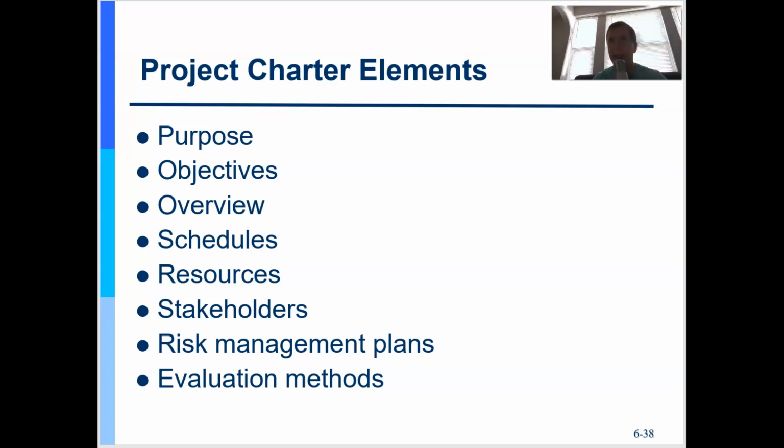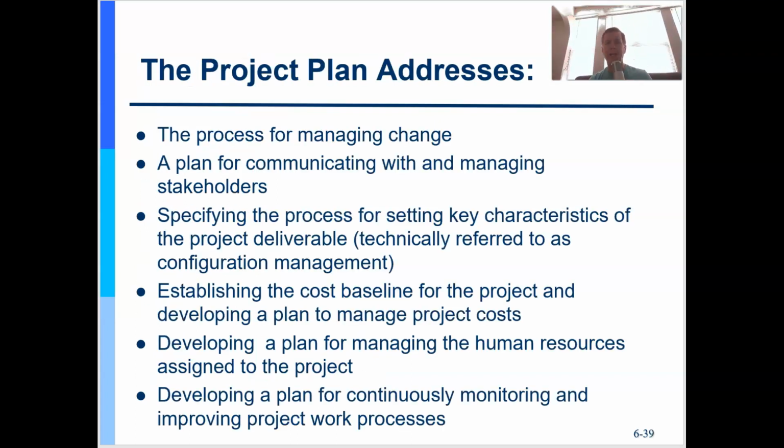So we then constructed a charter at a high level to define that bridge, the number of lanes, including the pedestrian lane, the lookout spaces, etc. And at a high level then, we would put a budget against that. We have these high level but measurable requirements in the charter, and we've even identified some high level risks and stakeholders.